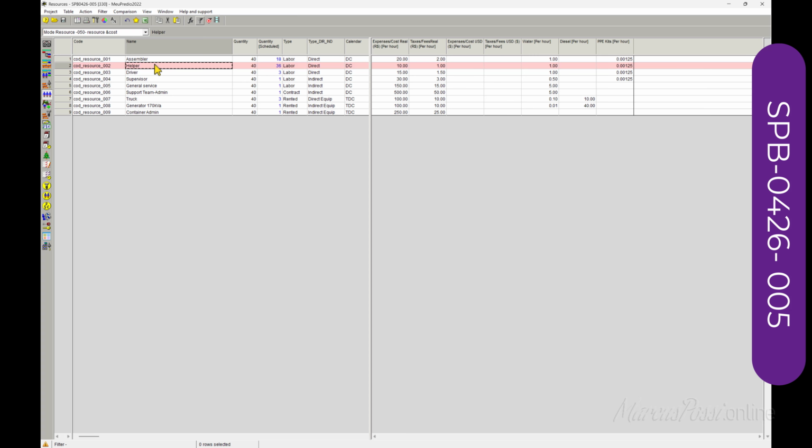You should divide by the number of hours it lasts, protecting workers, to get how this PPE is consumed by hour.